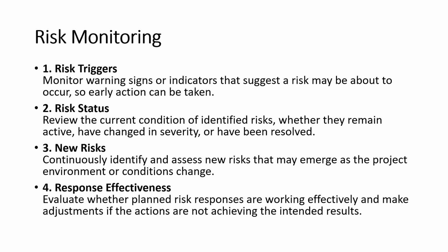The fourth is response effectiveness. This means evaluating whether the planned risk responses are actually working. If a response is not producing the intended result, adjustments may be needed. So the key message here is that risk monitoring is not simply watching risks. It is about tracking warning signs, reviewing risk conditions, identifying new risks, and making sure response actions remain effective. This is what keeps risk management active throughout the project life cycle.